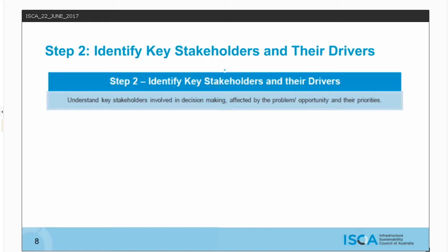In identifying stakeholders, look for people or groups of people who can either be impacted, either positively or negatively, by the sustainability initiative and/or influence the decision-making process that your business case will be subject to. These stakeholders could include internal project team stakeholders, internal organisational stakeholders, suppliers and service providers, end users, and local community stakeholders, including residents and local businesses.